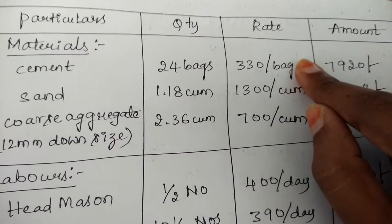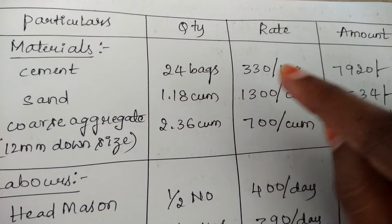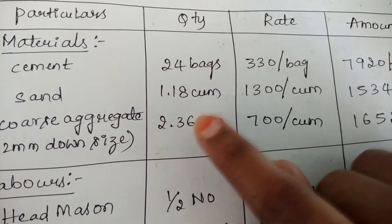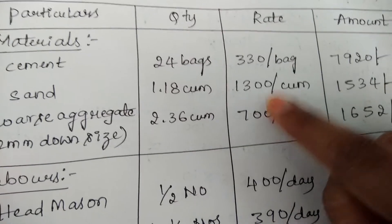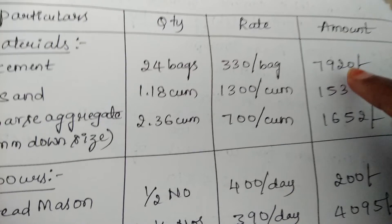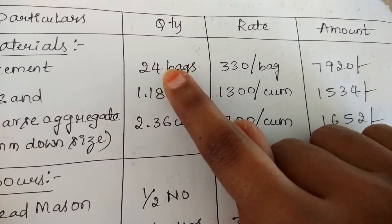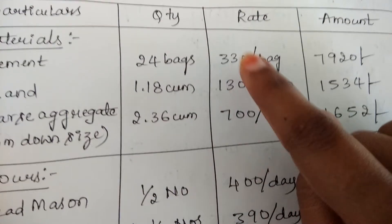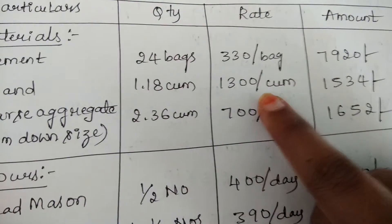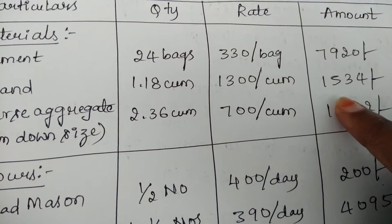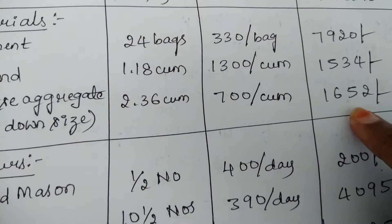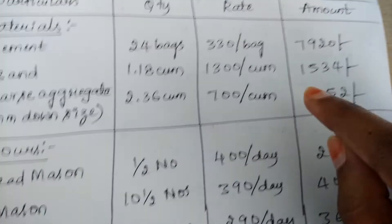Whatever the rate fixed nowadays, that rate we write here. The rate for cement is ₹330 per bag, for sand is ₹1300 per m³, and for coarse aggregate it is ₹700 per m³. For finding the amount we multiply quantity with rate: 24 × 330 = ₹7920; 1.18 × 1300 = ₹1534; 2.36 × 700 = ₹1652. So this gives you the amounts for the materials.